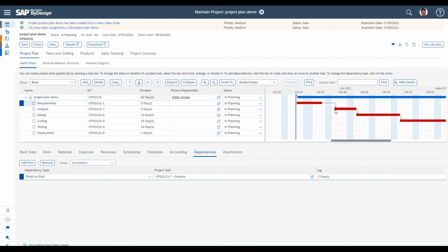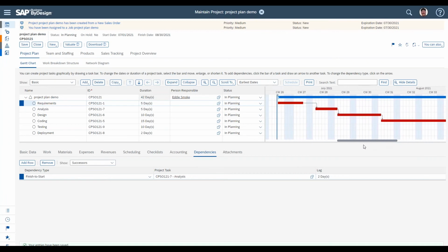Now, there was that little indicator on the task here that didn't allow the lag to shift, and we'll explain that right now. The whole reason we use these dependencies is that you can see it plots out these tasks as they occur in sequence over the life of the project. What's great about that is that as things change, either things take longer, as the duration increases, or the schedule changes, those changes will ripple and move the schedule for the tasks downstream.